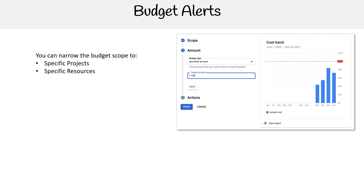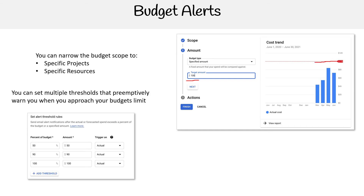You can narrow down the budget scope to specific projects or specific resources, and you provide a value — here I say $100. Notice that it draws a trend line so you can see where your spend is currently at. You can set multiple thresholds that preemptively warn you when you approach your budget limits — here I'm setting $50, $90, and $100.